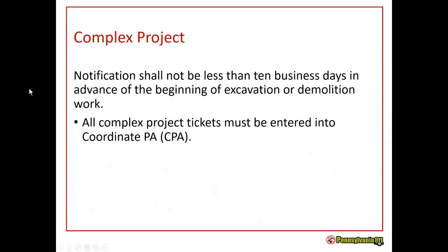If your project is larger than 1,000 feet or intersection to intersection, that can properly be described in a single locate request, you must submit your ticket through Coordinate PA. This is a complex project now. What makes a complex project?